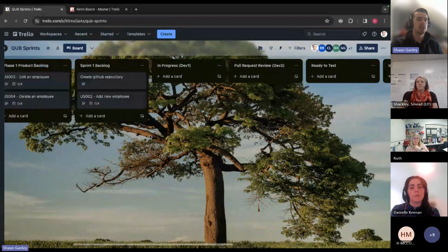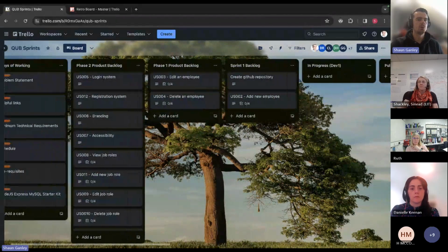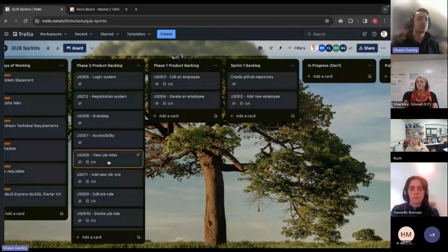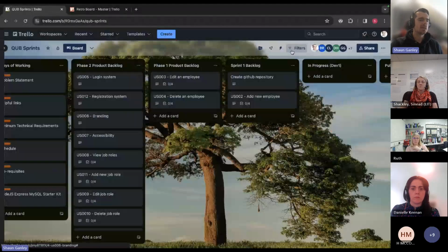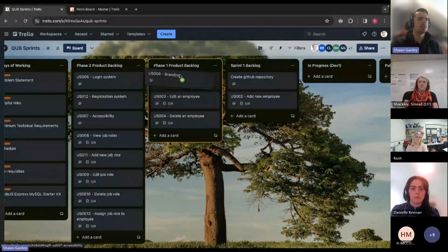So at the end of the first sprint, if people are working through the first product backlog, I would say, oh, that looks great. It would be really nice if that had some branding as part of it. So move the branding to be higher priority and focus on that sooner rather than later. And that means it's a team's responsibility to bring that branding ticket up to be higher priority, and that's what they can focus on in the next sprint.